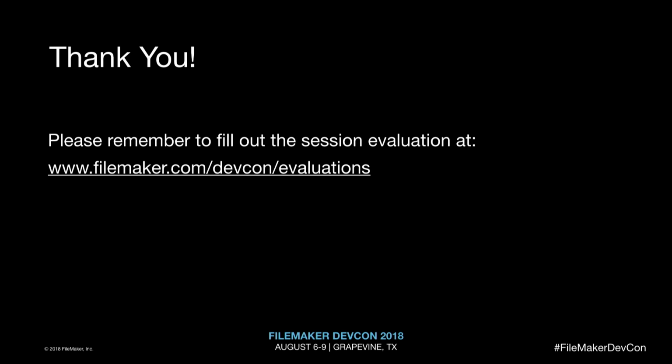But then when you deliver that to the client, in your next sprint, you can move into testing of what you've delivered to that client while you continue to build that next module, because in theory, you can be building that one module while testing and applying changes to that other module. That's the idea of iterating on different modules in parallel. Of course, that can change however it's needed for your team, but that is how I would recommend.